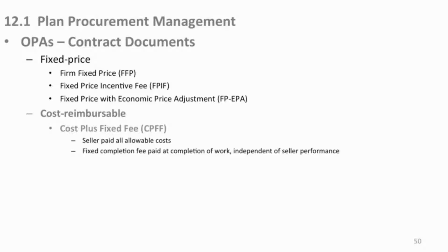And again, we could take days going through all the intricacies of all of these types of vehicles, and we're not going to do it, but from the perspective of the PMP exam, you need to know these basic things. So they're going to pay me for all allowable costs. If I go and make something really fancy, for one, it might be out of scope. We don't want it, but yet that's money I spent. You're not going to give it back to me because it wasn't allowed.